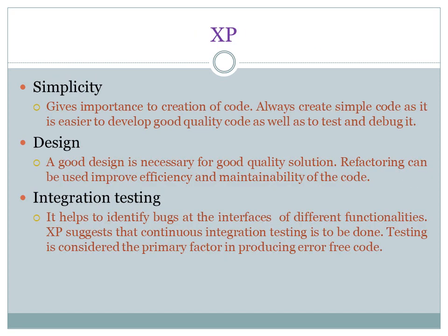Another comparison, with the RAD model. The Agile model does not recommend developing prototypes, while the RAD model is based on designing quick and dirty prototypes which are then refined. Agile models logically break down solutions into features that are incrementally developed and delivered, while the RAD model focuses on development of all features of an application first and then improving them. In the Agile model, only completed work is demonstrated to the customer. In the RAD model, it demonstrates prototypes, customer screens, etc.